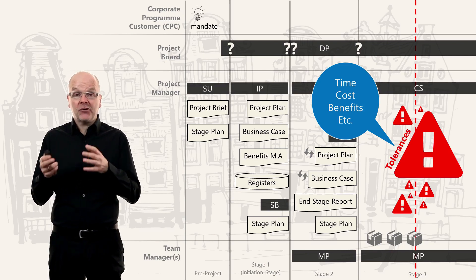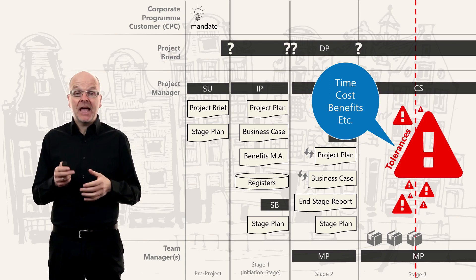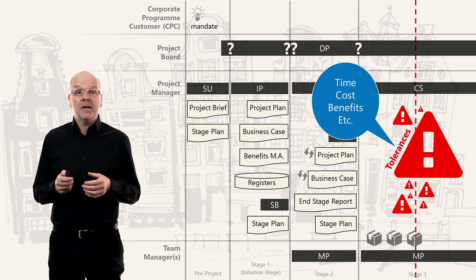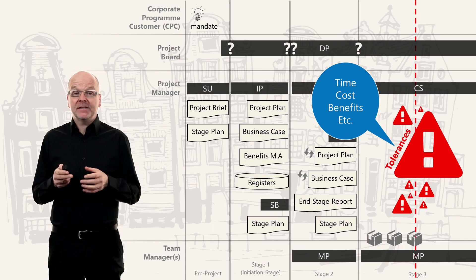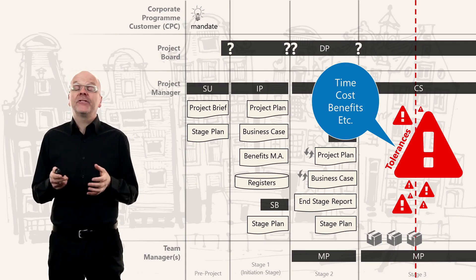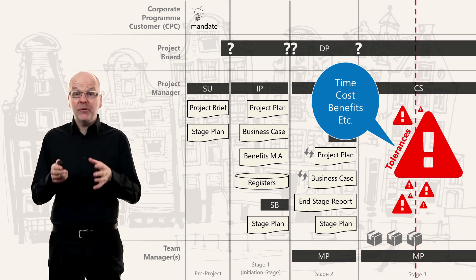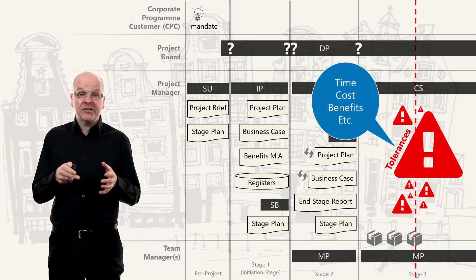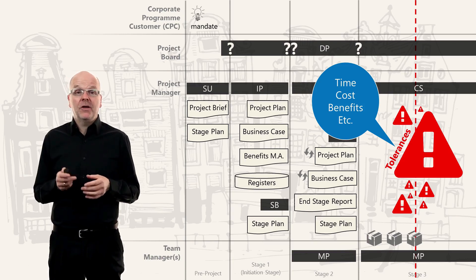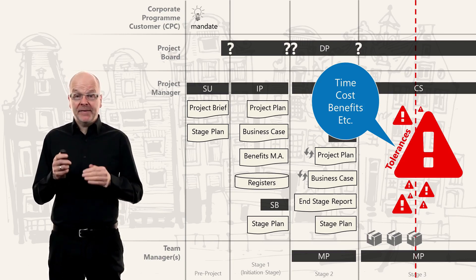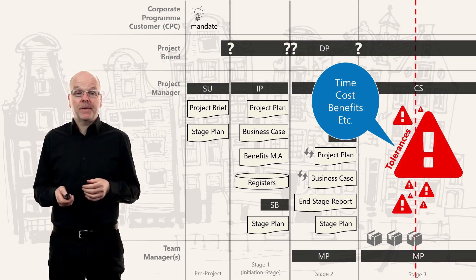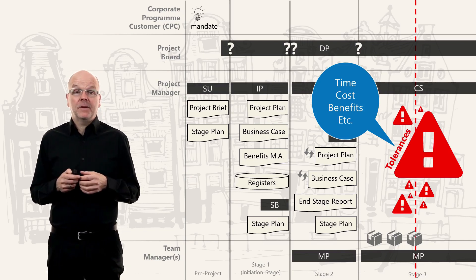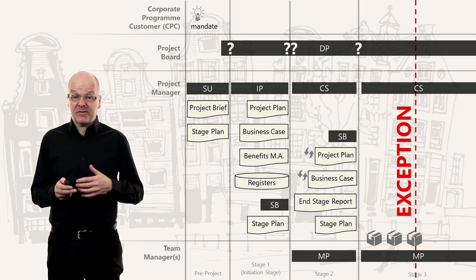If costs increase by only 8 percent, the project manager can take action and spend money to deal with these issues. But if the costs go above 20 percent and the tolerance is only 10 percent, this is outside the project manager's tolerance — they must escalate this issue to the level above. An issue that brings us out of tolerance is called an exception.